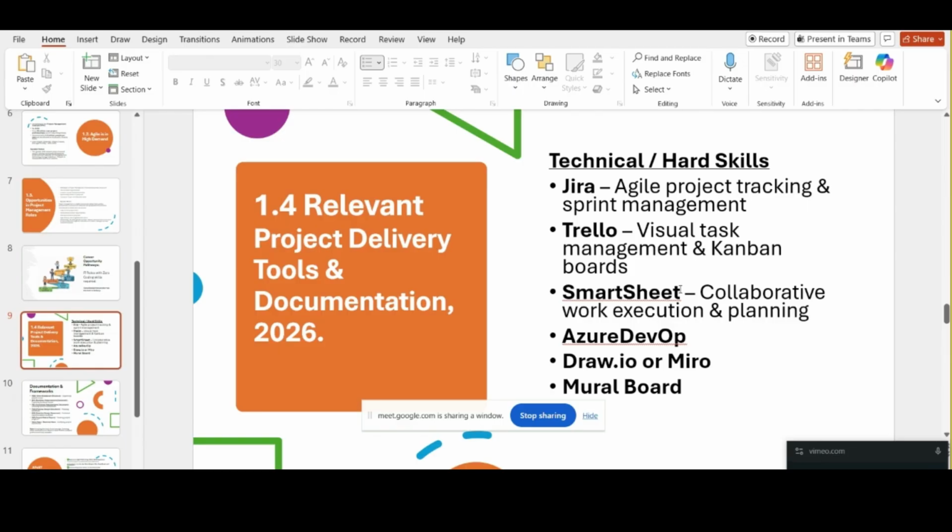Because remember that while a project is temporal, we cannot just depend on the fact that we have a start and end date of project delivery. A lot of things happen between that start and end date, including tracking. So we must ensure that as we have the start and end date, we expect to track per milestones. So we need to know what milestones we are trying to achieve and what time we're trying to achieve these milestones for. So that would give us that headway, because that's the whole idea. So Smartsheet helps us to do all this.